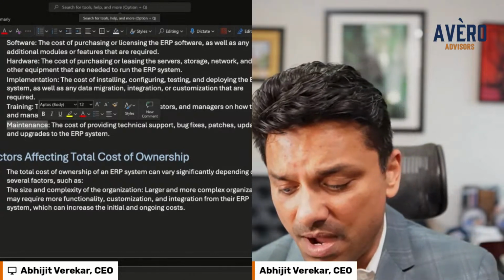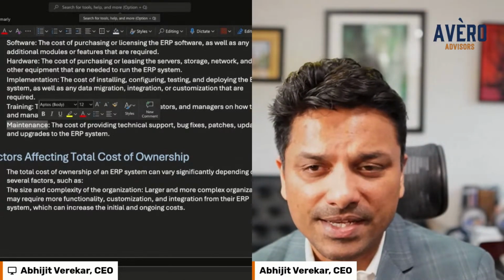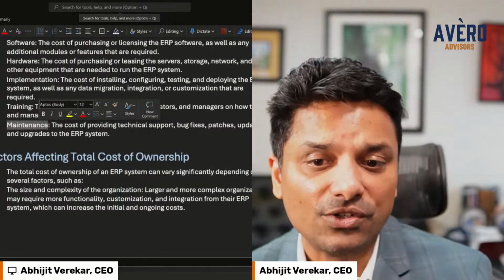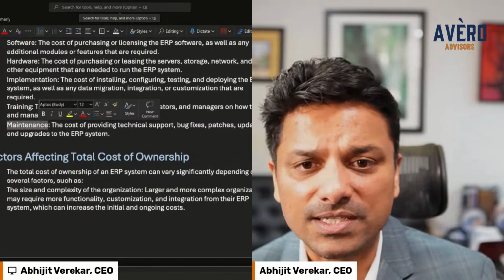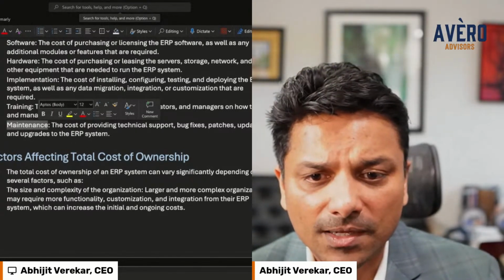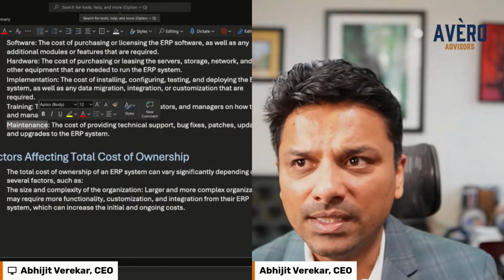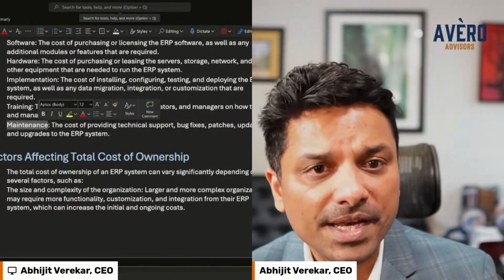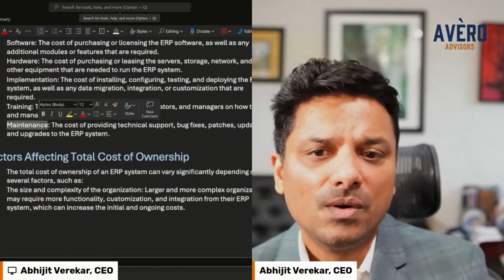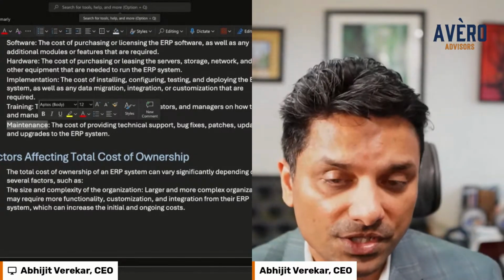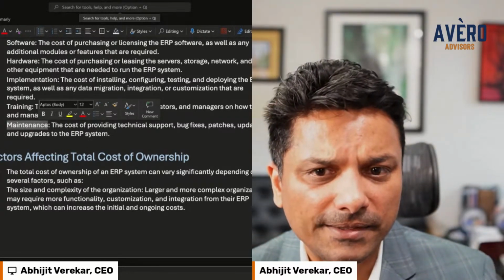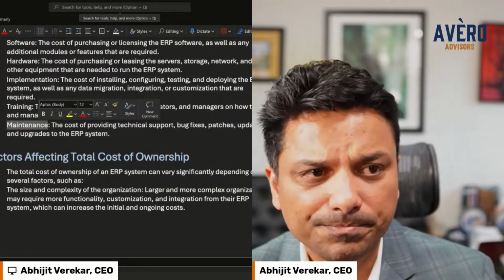But if you had to buy new equipment, new IT infrastructure for you to be able to use this system, then yes, you have to factor those costs in, or fractions of, because infrastructure is not necessarily dedicated to that one system you're buying. And then ongoing costs, right? There's again many ways to skin this cat. You can classify this as capital expenditure to the point where you go live, and then it turns into operational expenses. It really depends on how you have your budgets and finances set up.